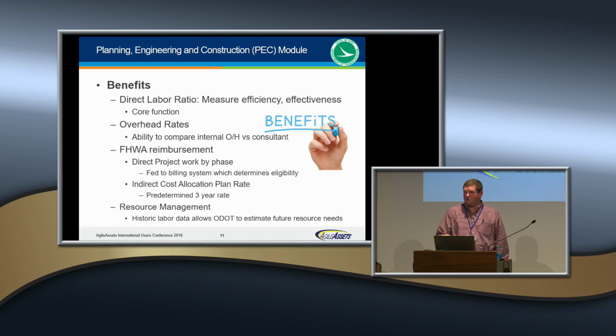So we actually use this and we bill them. So when I say we bill them, if we have $100,000 on a week's bill, we actually apply another 100% to that and we get $200,000. That's our overhead. We calculate that rate again on an annual basis and we apply it, and we get double the money. Pretty simple stuff for what the effort is to get the information in.